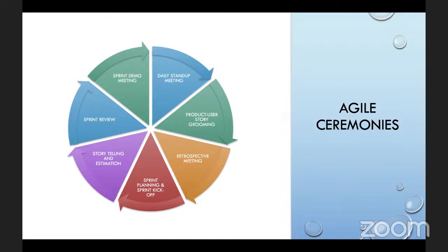The product owner, with the help of the team, will also need to ensure that each story has been sized properly. If you're going to start working on something, make sure that everybody's aligned and stories have been properly sized. If it's 2 point, 3 point, etc., we've sized the story very well, and the expectation of it is known to everyone as well, right? If there's a story that is too big, we can go ahead and split it quickly as well, and make sure that everybody has enough work to do.